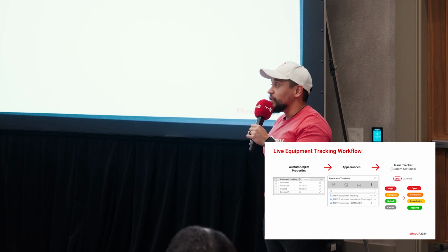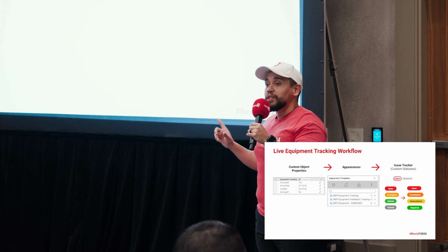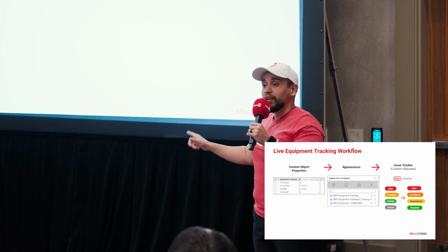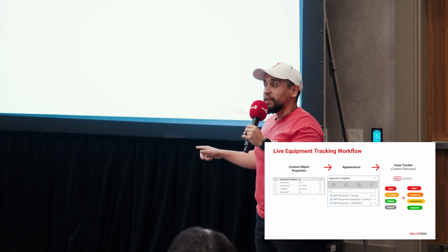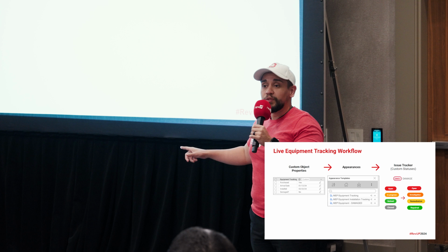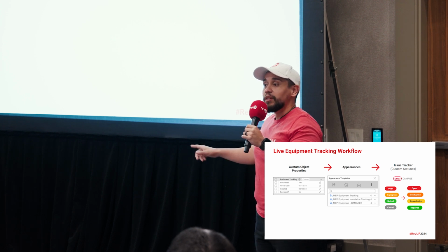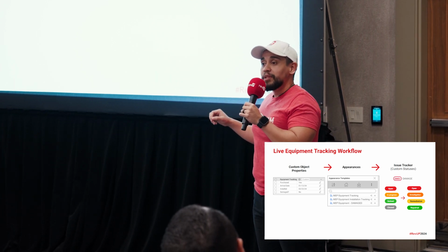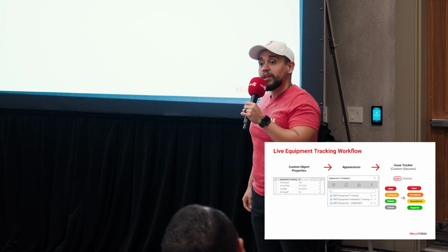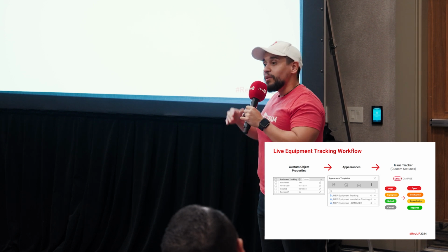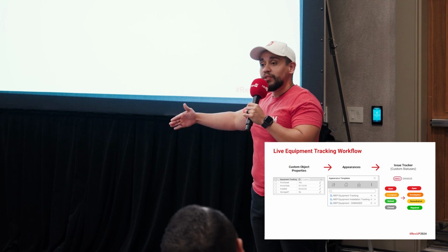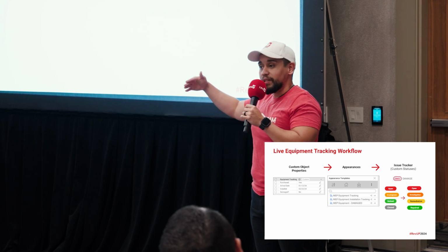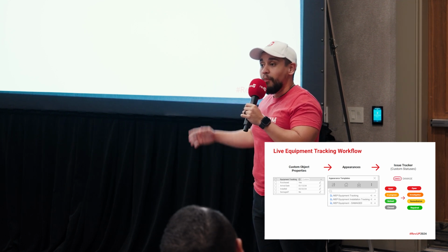And so if you get to the point where you have a moment of divergence, you are deciding whether you should go as far as applying status to the model in a color with a custom status, and instead could it just be good enough to use the issues to start, and can I just add my issues as a way to track that item instead? As long as you're creating the stamp and it has the model object associated to it, then it's just as good to use as a way to track instead as well. So there's always that point where, if that's too much to chew for your field teams, you can always just say custom statuses is the way to start and eventually get to actual model status of objects as well.